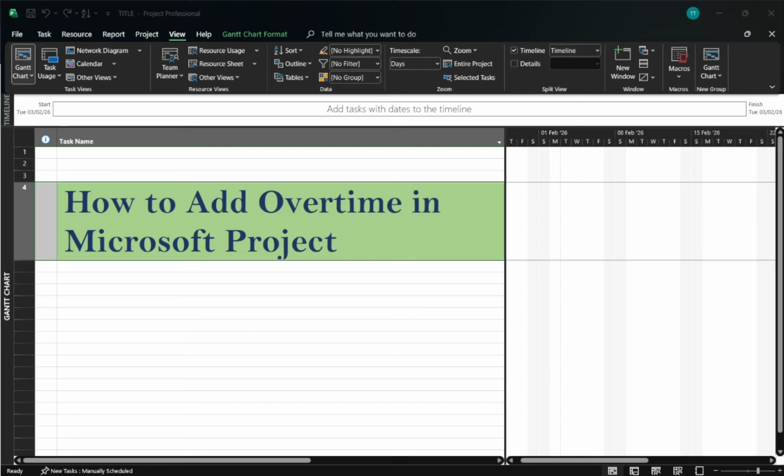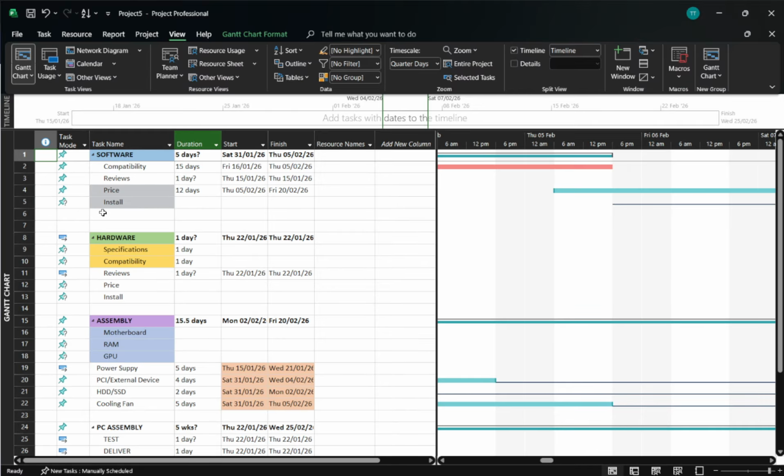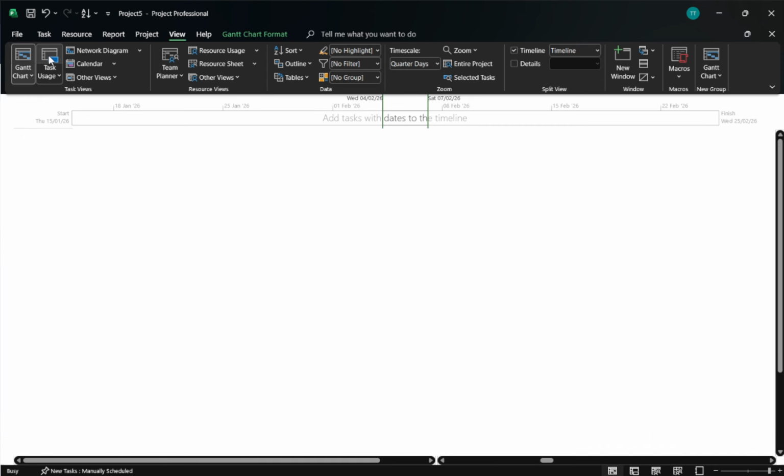In today's video, I'm going to teach you how to add overtime in Microsoft Project. We'll focus on the desktop version and walk through the clearest way to record overtime so your schedule and costs stay accurate. There are two parts: entering the overtime work itself, and, if you track costs, setting an overtime rate for each resource. Start by opening your project and switching to the task usage view.